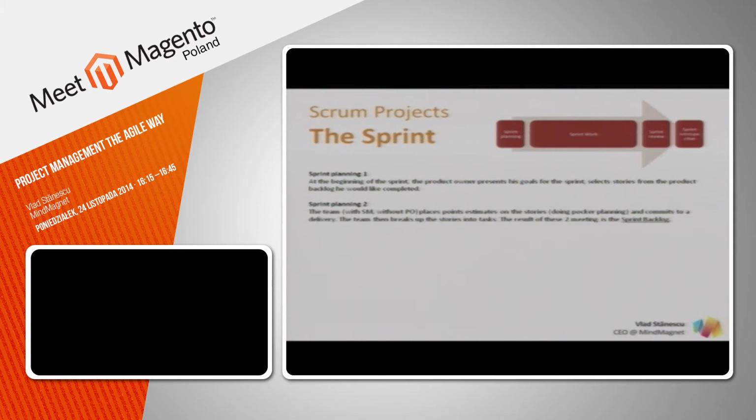Then the team commits on a certain set of tasks that they will deliver in that sprint. So a sprint might have 60 story points, based on the total number of story points the stories would add up to. And they commit that that delivery will be done in the 2 or 3 weeks the sprint has.